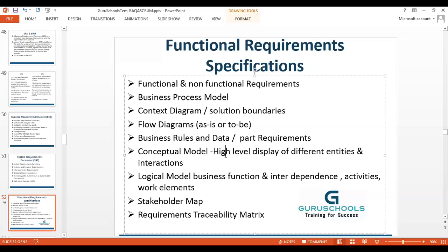And the requirement traceability matrix. This is copied from the SRS and evolved to the next level. So who is going to work on which requirement? The procurement division will go to Ravindra to procure Philips and Sony in the numbers required. The development team reports to the PM named Keshav. So Keshav will have 80% of this requirement, as in software development unit, and the integration and infrastructure requirement as well, and so on and so forth.